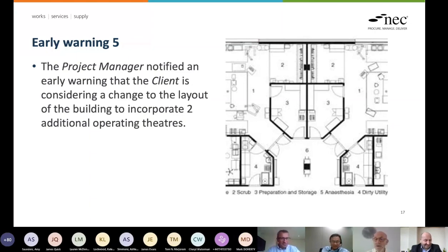I don't think we should. I think changing the piles would be a big issue. But I think we can design some transition beams at the head of the piles that we currently have out. And I don't think there'd be too much cost in that really. Concrete rebar, it's just perhaps in a different place. So some drawing, a bit of design. Just a thought though.